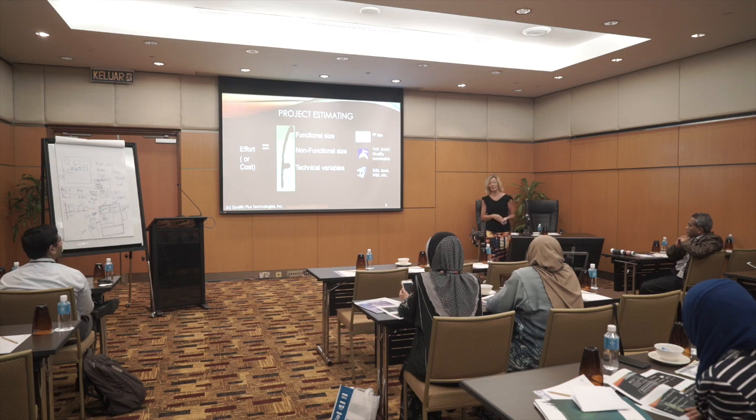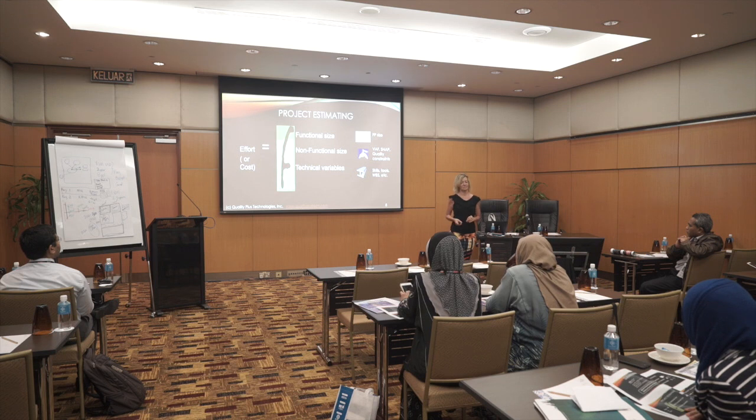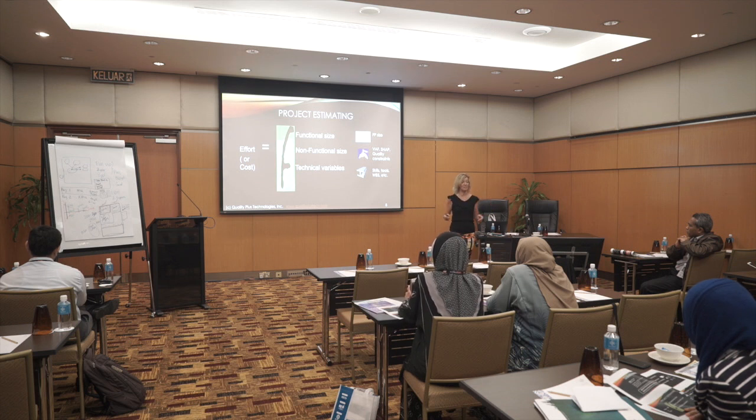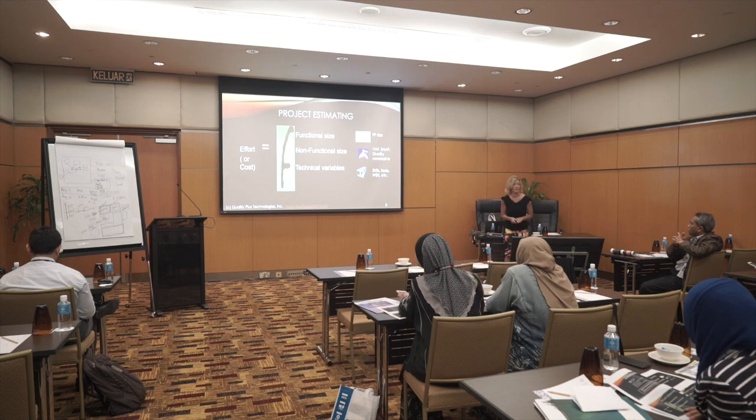A lot of times they'll say, okay, how big is it? 6 months, 30 people. Is that a size? It's a size of how big we think the effort's going to be, but it has nothing to do with the product. So function points is going to give us something to do with product size of what we're delivering. But we'll never be accurate.